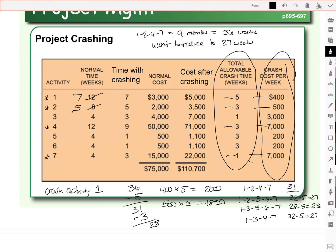So by changing activity 2, our critical path of 1, 2, 4, 7 went from 31 to 28. The path 1, 2, 5, 6, 7 also declined because it contains activity 2. And so it went down by 3 from 27, and now it would be at 24.